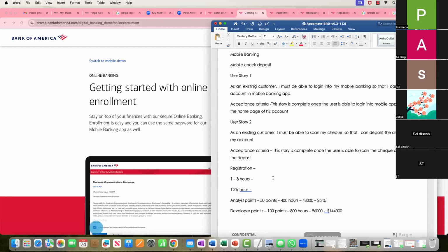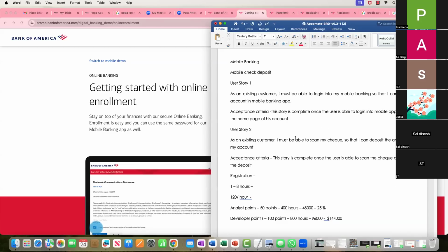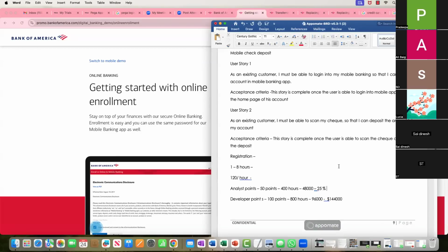So when you're estimating story points, maybe for this story it's going to take 8 points, please bump up at least 25% extra, so that you have that buffer. Okay, and you're safe also. For the next 3 months, you have something in your funding and your job is safe. So it is very, very, very important for you to understand story point estimation and LOE, level of effort estimation. Please don't underestimate, and don't get into trouble.